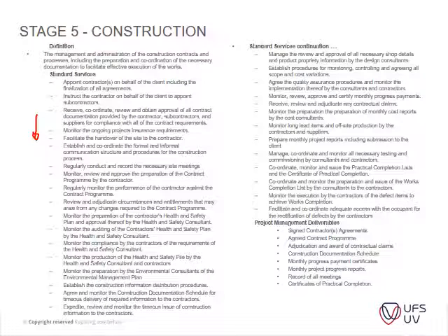And then the outcome at the end is a signed contractors agreement at the start of the project, agreed contract program. Is it resource based? Is it not resource based, etc. Adjustment and award contractual claims, construction documentation schedule. You've got your monthly progress payment certificates, monthly project progress reports. Again, you need to record all your meetings and certificates and practical completion. So very important, your administration is key to all of these items.